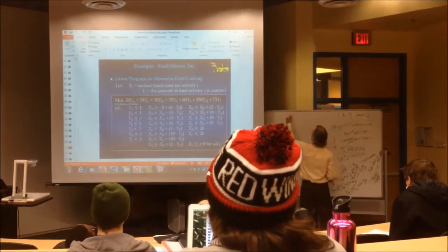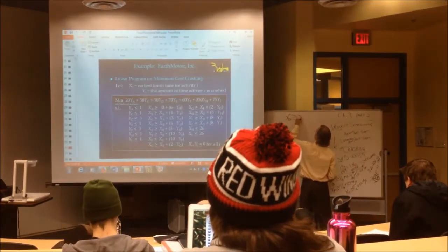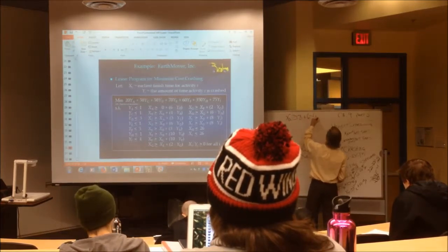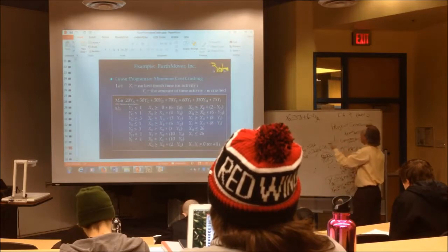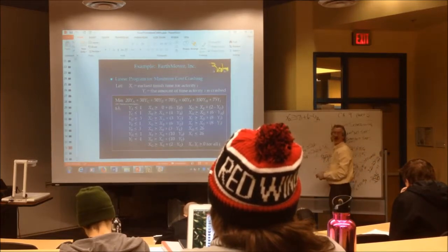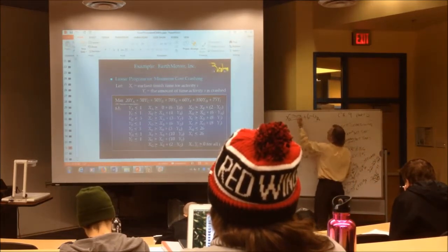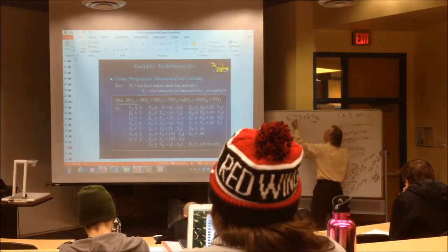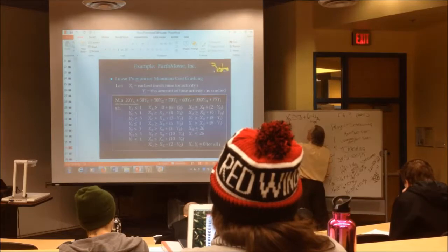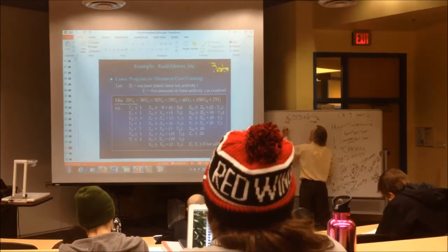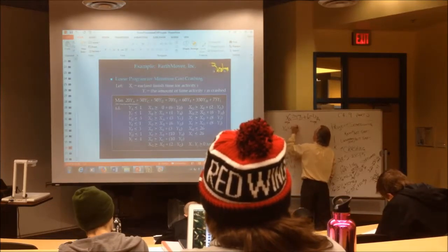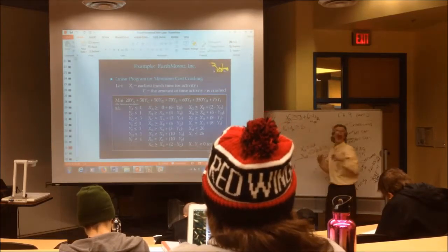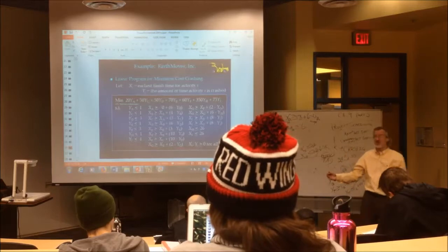I got X sub A greater than or equal to 0 plus the normal time, which is 6, minus Y sub A. Is that right? Is that 6? All right. I got a variable on the right here, Y sub A. The 0 doesn't matter. 6 plus 0 is still 6. But I'm going to have to add Y sub A to get rid of it. So whatever I do to one side, I do to the other. So I have X sub A plus Y sub A greater than or equal to 6 plus 0, 6. Now it's a finished constraint ready to enter into the software.